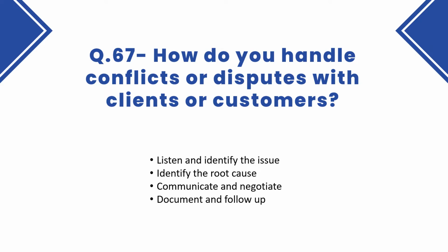After listening to their concerns, I identified the root cause of the delay as a lack of resources on the team. I communicated this to the client and proposed increasing the team size to ensure that the project would be completed on time. The client agreed, and we were able to successfully complete the project on schedule.